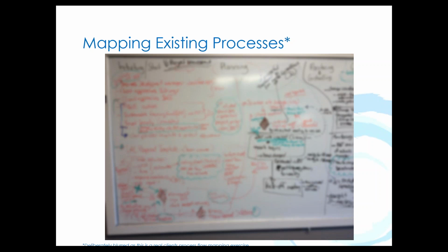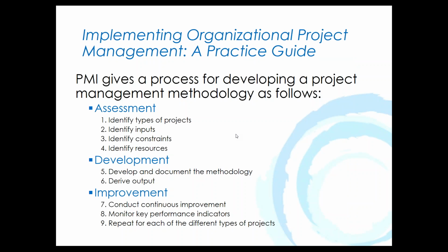that they didn't have a process there and they needed one. So that's how we mapped out their existing processes, and we actually turned that into a formal diagram, and then we went ahead and filled in their blanks, gave them a user manual and all the missing templates that they had. So a relatively simple process, but we started by mapping out the existing processes rather than coming in and simply imposing on them an off-the-shelf or one of my own solutions, which never works entirely. Again, always start with figuring out how things actually work in your organization.